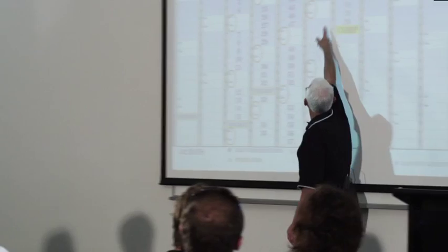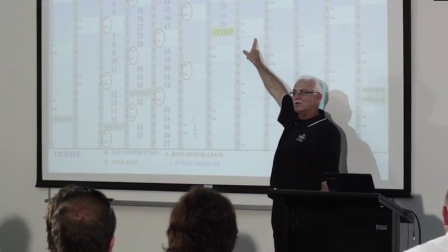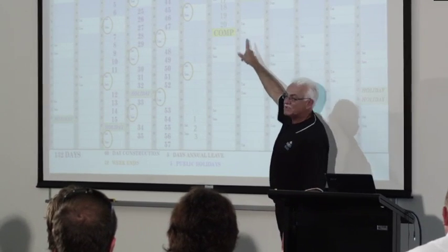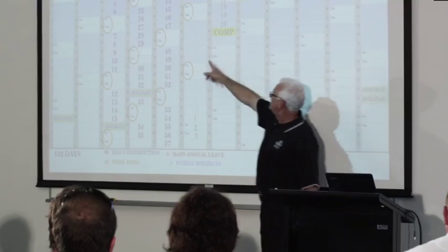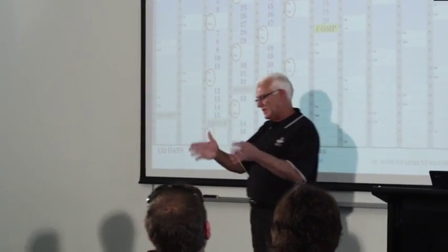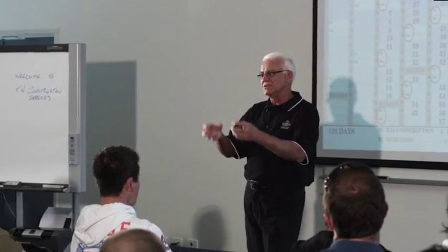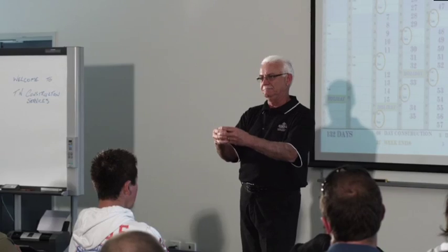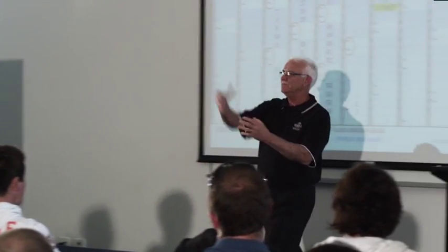So what's that going to do? It's going to put you a month behind on your contract. What's that going to do? That's going to hit you up with liquidated damages because you've gone over your completion date. My advice would be, do not put a start date down there if you are responsible for any of the conditions that require you to start, because you might not be able to control them. All right? Question?